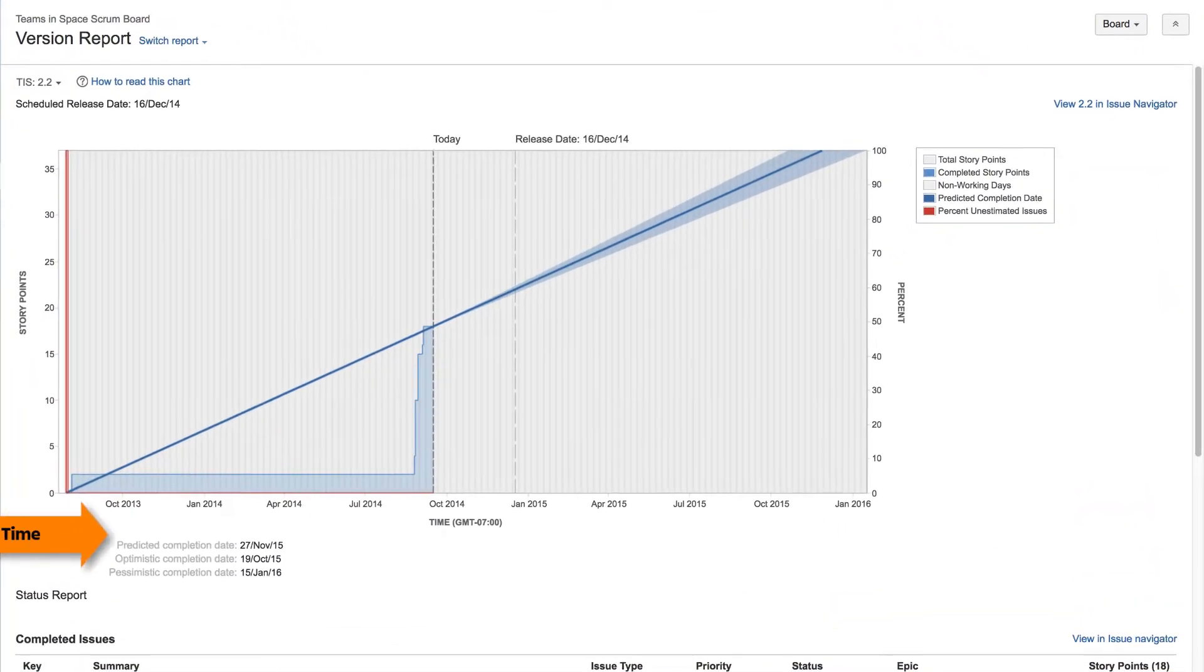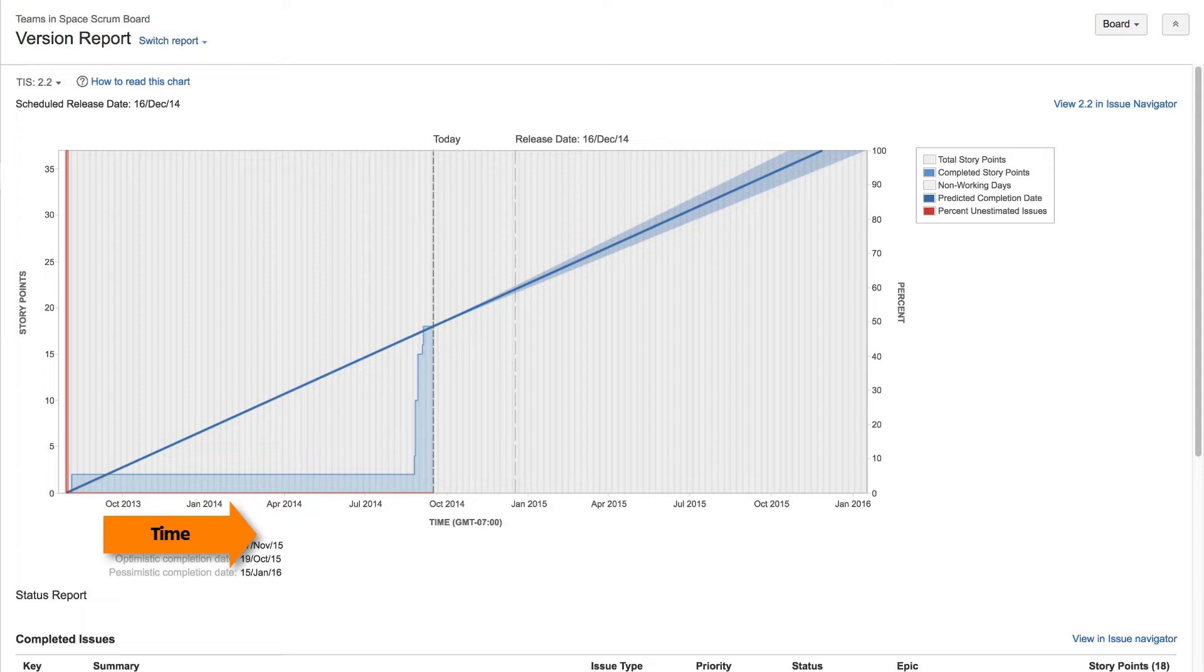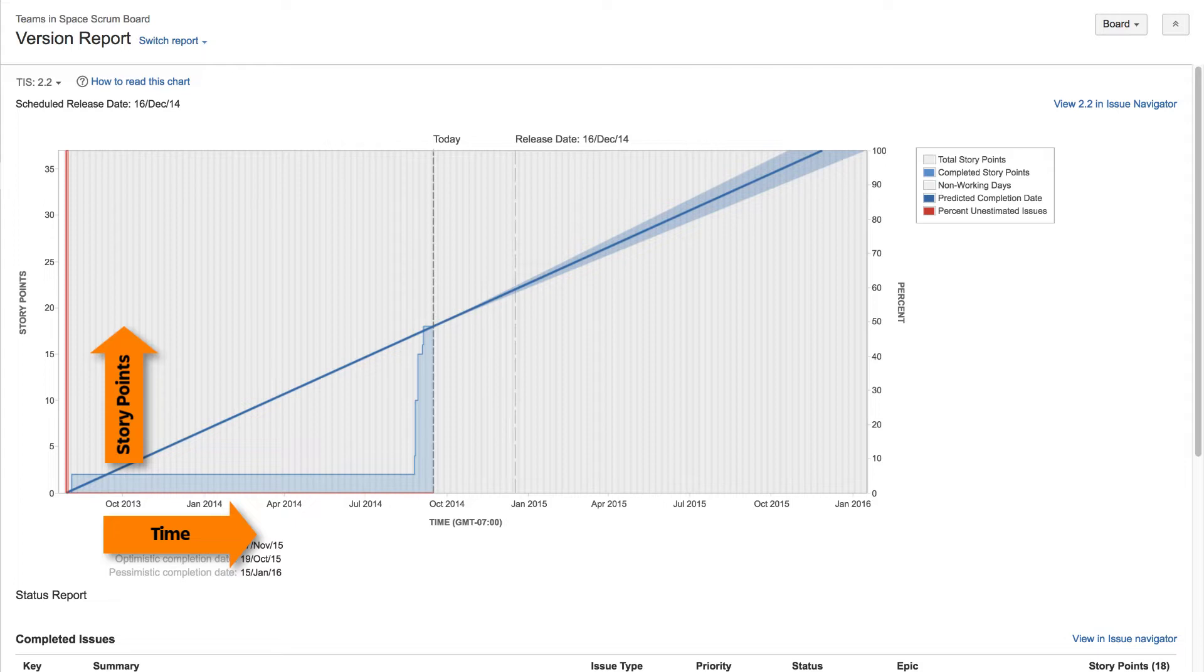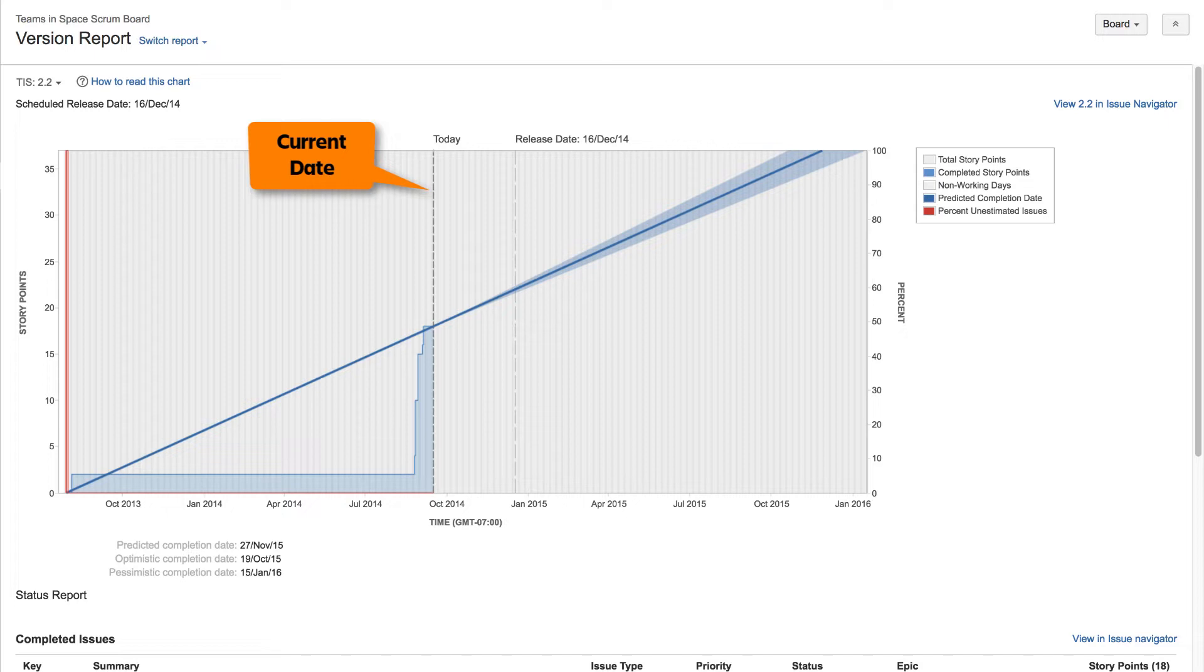The horizontal axis displays a timeline beginning with the version start date. The vertical axis displays story points or the estimation statistic of your choice. The dotted black line marks the current date. The dotted gray line indicates the scheduled release date.